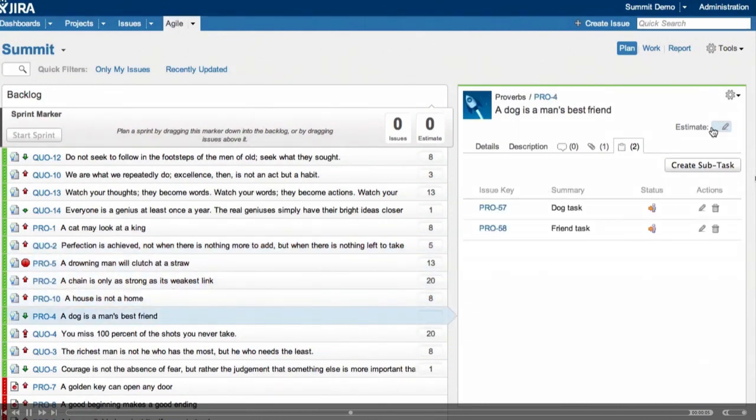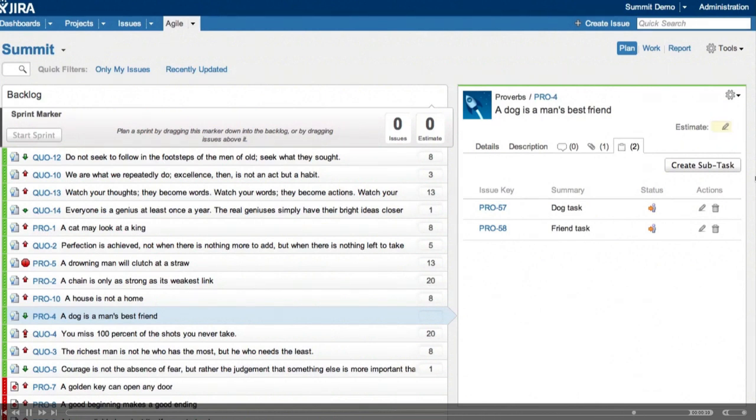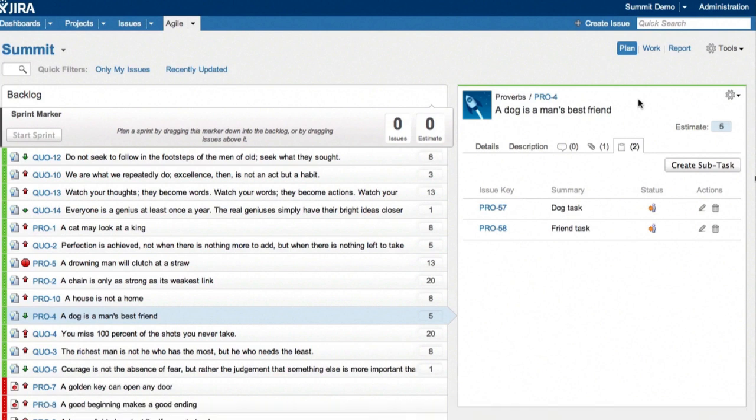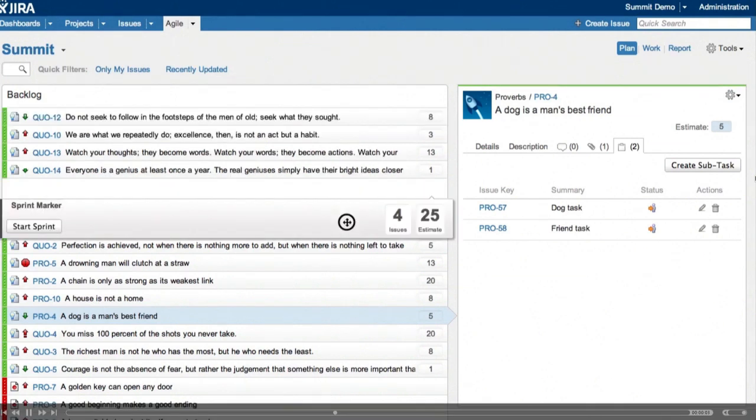I've got one issue here that doesn't have an estimate, so we're just going to select that and go over here and enter that estimate. As I said before, it's the inline edit for this. It's now updated. So the backlog is starting to look nicely prioritized.